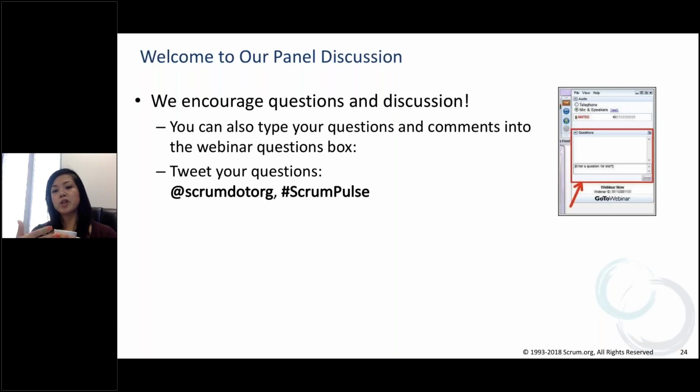We need to have those conversations at scale about what work we can pull, what dependencies we might be facing, before we can then go into our individual sprint planning for the individual team. So the only difference is that it's before we do our individual team planning, and its main purpose is to look at what else we can do to pull apart the work for the sprint in terms of dependencies. And a big help for that is going to be refinement.